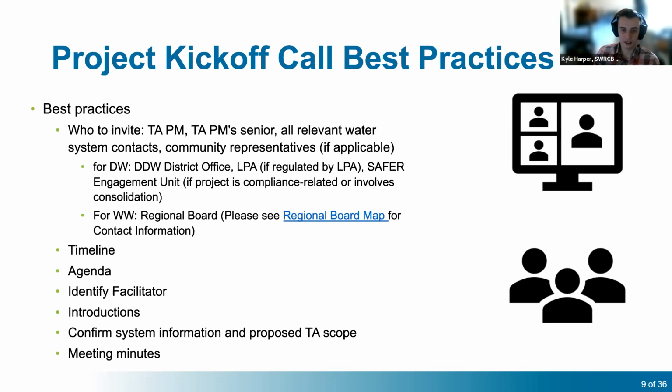So going back to best practices, the purpose of the kickoff call is to get everyone on the same page. That's why we would like the proposed project timelines to be discussed in the kickoff call. And a crucial step to the kickoff call that goes even before the meeting happens is we would like a meeting agenda prepared and sent out ahead of the kickoff call.